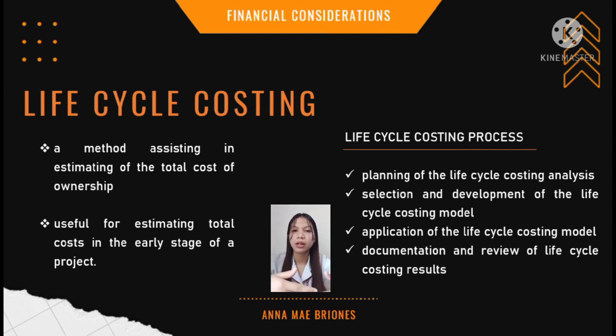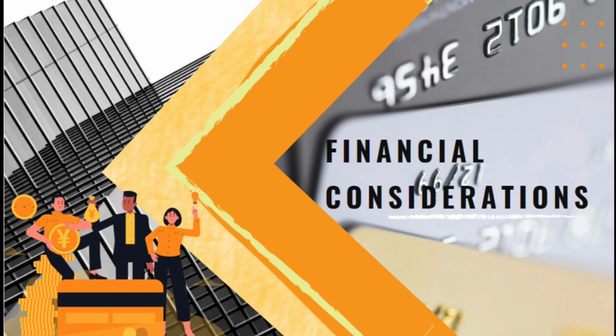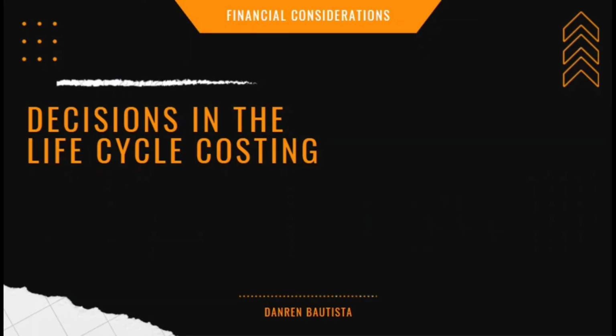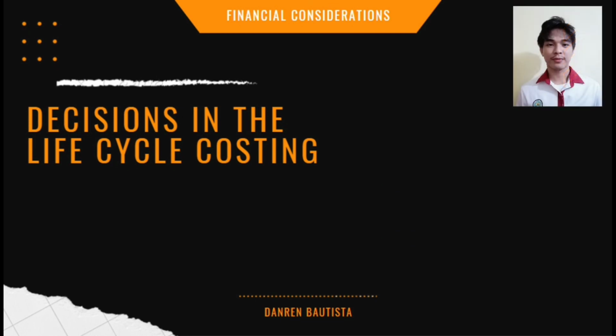So the life cycle costing process includes planning of the life cycle costing analysis, selection and development of the life cycle costing model, application of the life cycle costing model, and lastly, documentation and review of life cycle costing results. Decisions in the life cycle costing process.